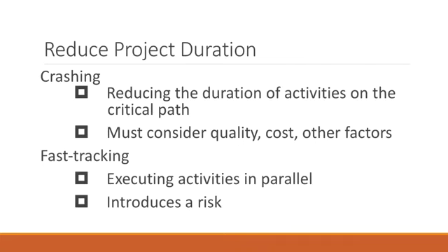Now, the other possibility of reducing the project duration is fast tracking. By fast tracking, what that's supposed to mean is that things are usually working in parallel. I don't know how familiar you guys are with the idea of pipeline, but I'm pretty sure I've mentioned it a couple of times along the course. Pipeline means that you can execute a couple of tasks at the same time, and because the tasks are not directly related with each other, you guys will actually reduce completion time significantly.